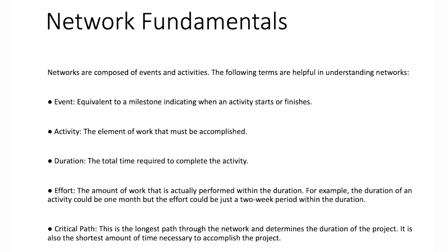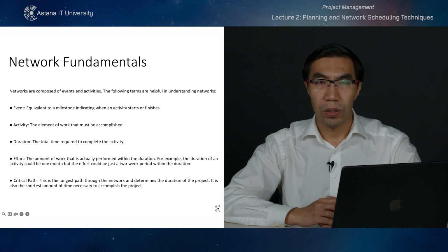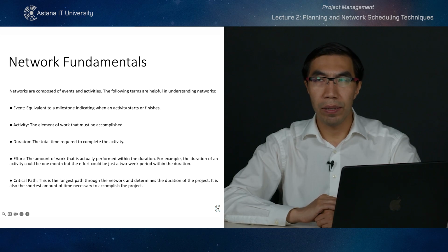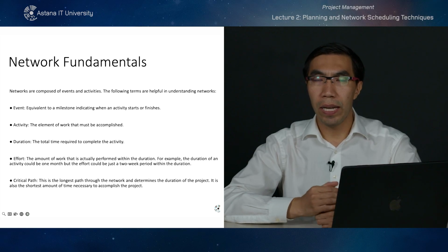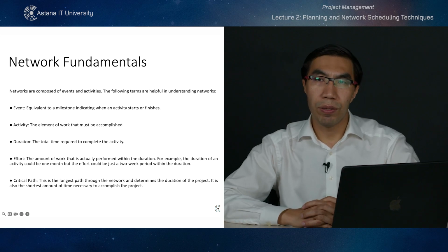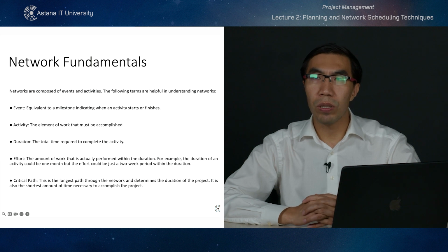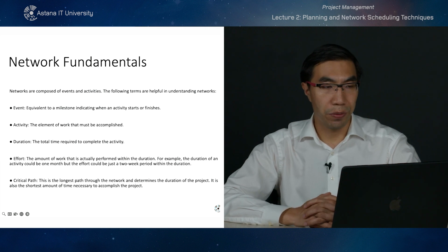When you're creating such networks, they're composed of events and activities. These are definitions for the event, which is equivalent to a milestone indicating when an activity starts or finishes. Usually you will have milestones in your schedule, and a milestone is a point in time event. I can give you an example: approval and signing of the project charter will be the milestone for the end of the initiation phase.